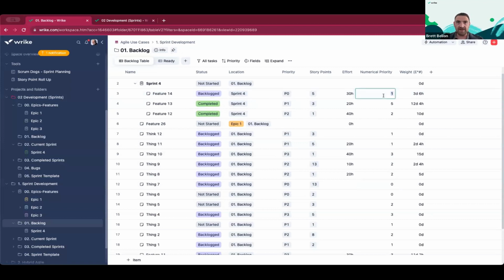The way I've done it here is the higher the priority, the lower the number, the more effort here, the more effort here, and then multiplied across. This gives you a sense that, oh, this is probably the lowest hanging fruit we should take on, right? It has the lowest number because the highest priority is just inverse with effort here. And you could do this in any other way, right? You could look for a higher number and have the higher priority as your number there.